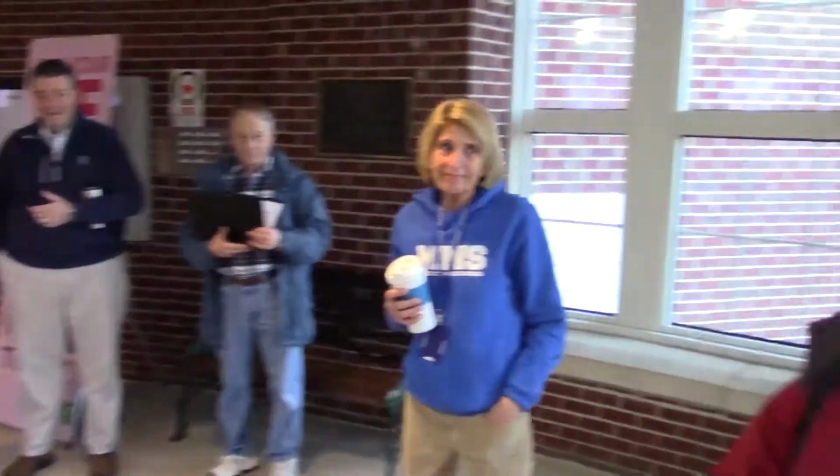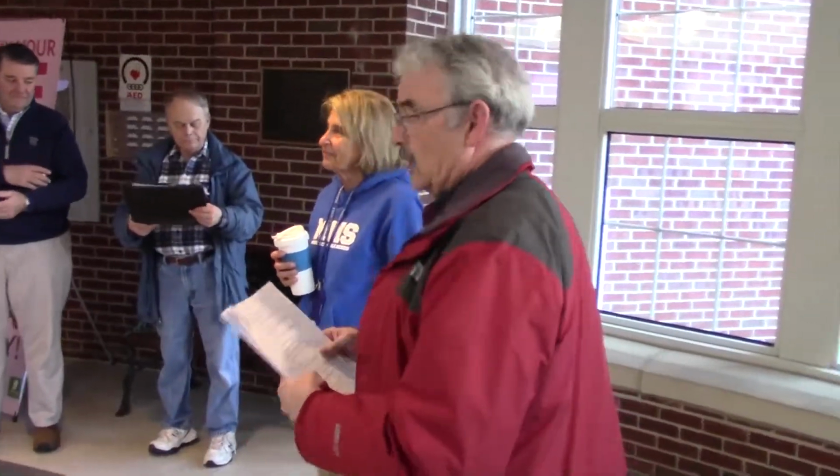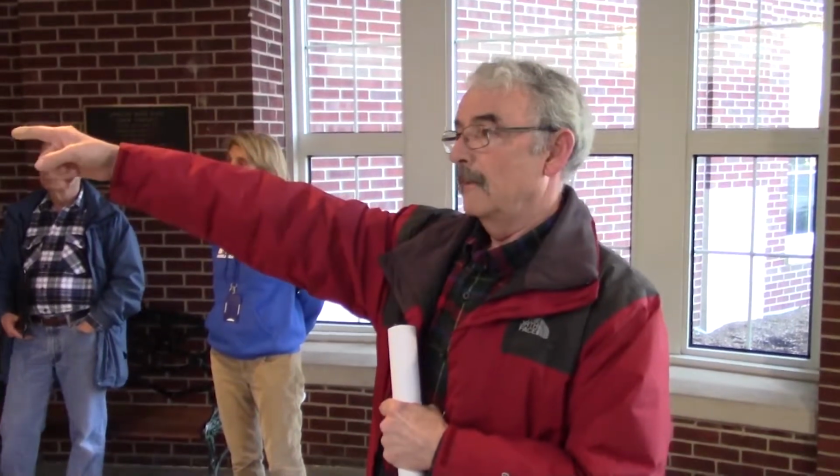Good morning, everybody. What we wanted to show everybody here: last year the capital project for this building included carpeting and redoing the main office, which we did, and running the gas line up into the building and into the boiler rooms, which is complete except we're waiting for Eversource to come with the meter, supposed to be sometime this week. They ran a gas main up from the west, up through one of the streets in the back, across the back of the property and into the building. So we can look at the